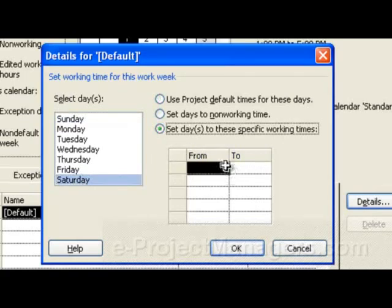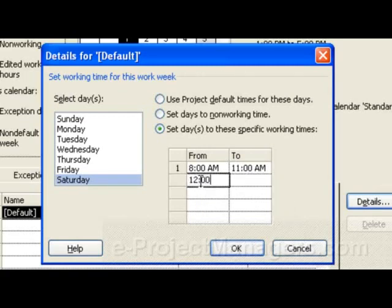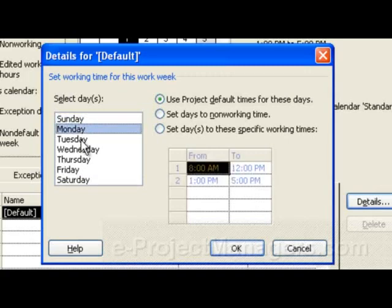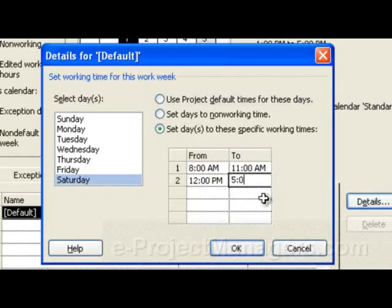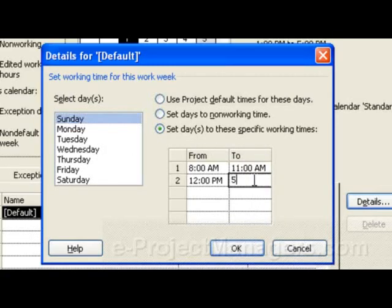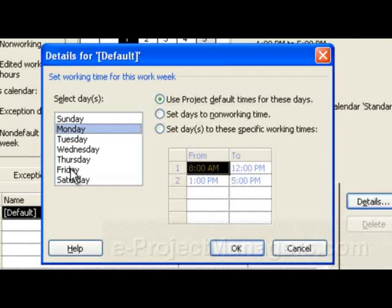Now I'm going to click on Saturday and do the same thing: 8 a.m. to 11 a.m., and then 12 p.m. to 5 p.m. Now both Saturday and Sunday start at 8 a.m. and end at 5 p.m., and we have Monday through Friday that start at 8 a.m. and end at 5 p.m. as well.